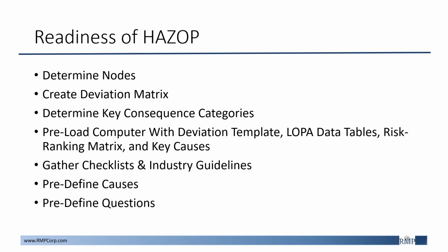The facilitator's final step is to predefine questions that may arise after reviewing the information provided to them regarding the system. These questions should be asked and answered when they come up within the study. For example, questions regarding information on the PNID should be asked and addressed when introducing and describing the node to the HAZOP team. These questions can help the facilitator improve their understanding of the system and thus reduce the session time being spent going through the nodes.